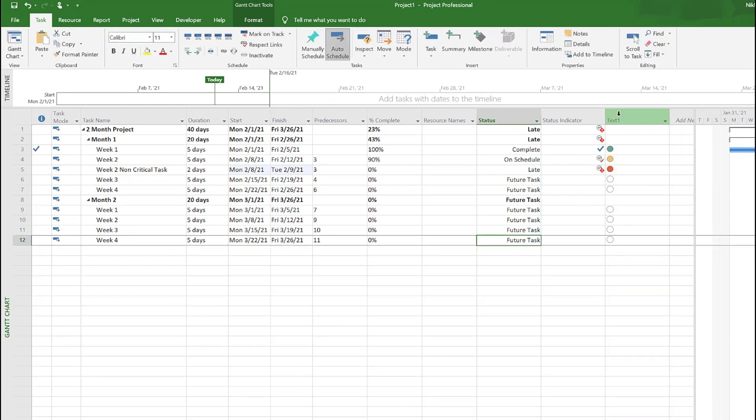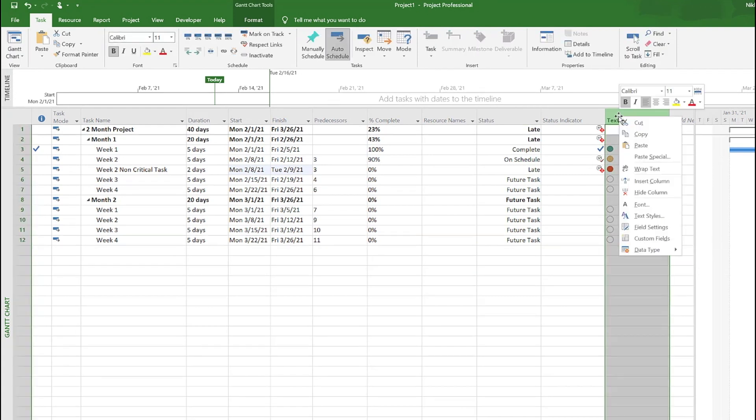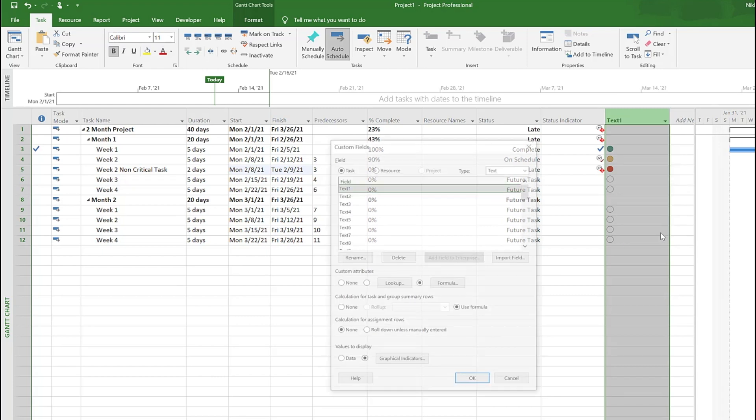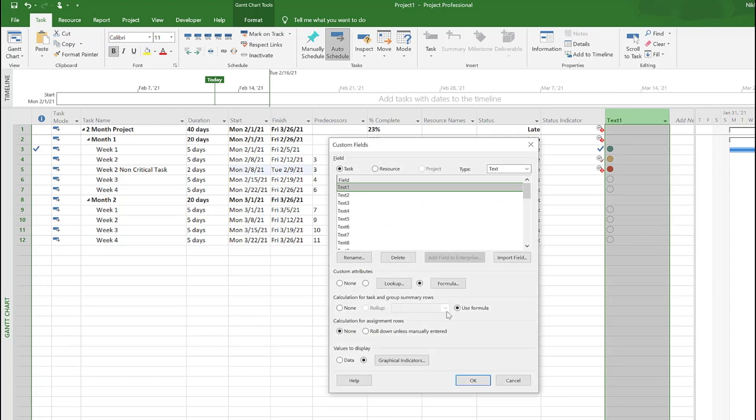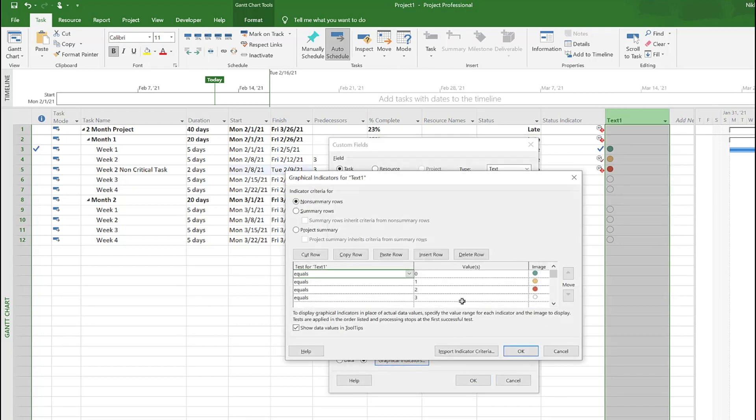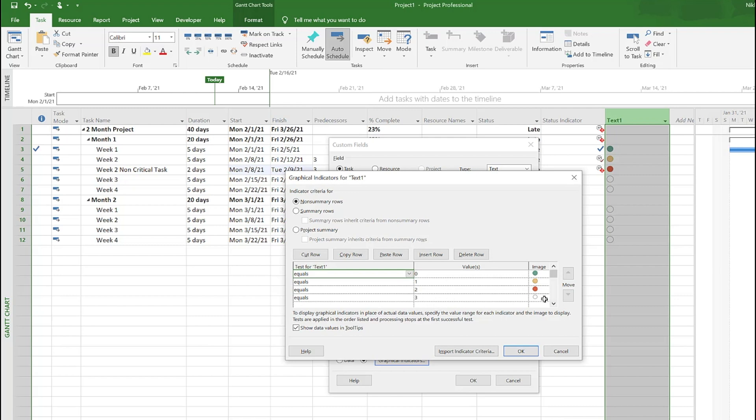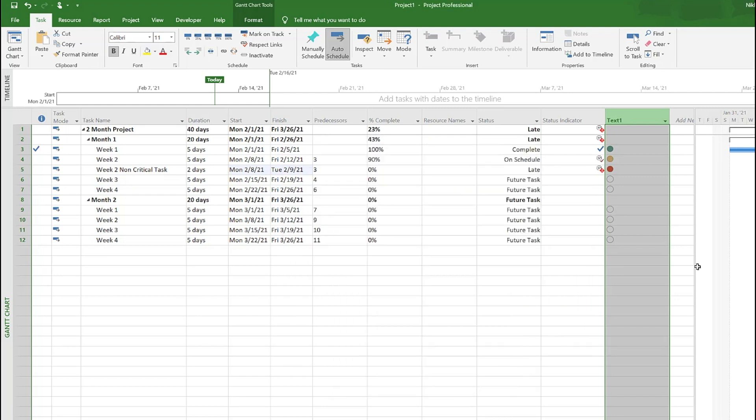If I go to right-click and say custom fields, and if you look at the graphical indicators, you would see I assigned zero complete with green, one which is on track with yellow, two is delayed or late with red, and three which is future task with white.